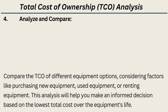Step 4: Analyze and compare. Compare the TCO of different equipment options, considering factors like purchasing new equipment, used equipment, or renting equipment. This analysis will help you make an informed decision based on the lowest total cost over the equipment's life.